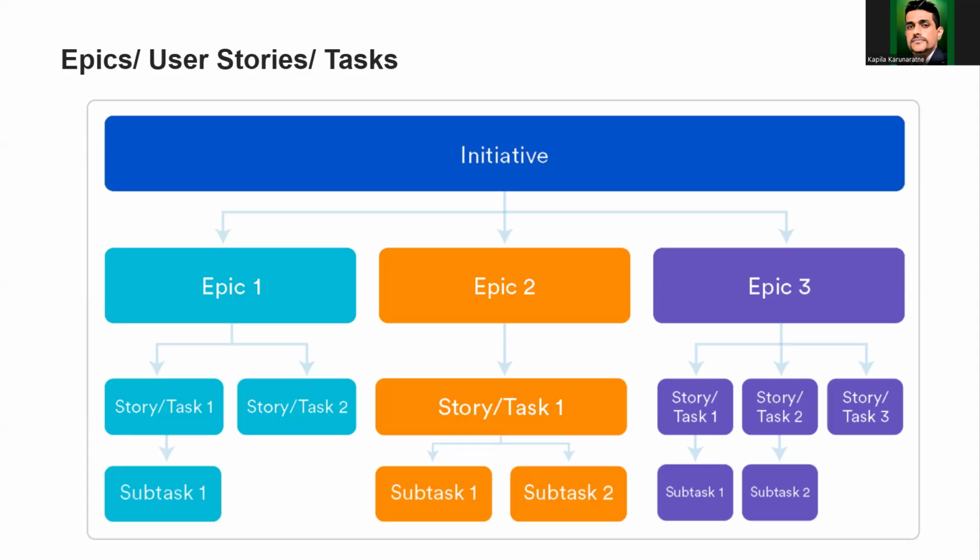Then you can define how you are going to do that, and there will be another user story: selecting roads by giving the exact coordinates or address names. So those are two stories. For payment, you can pay by credit card, by different wallets, or by cash. Those are different user stories, and the epic will be payment.